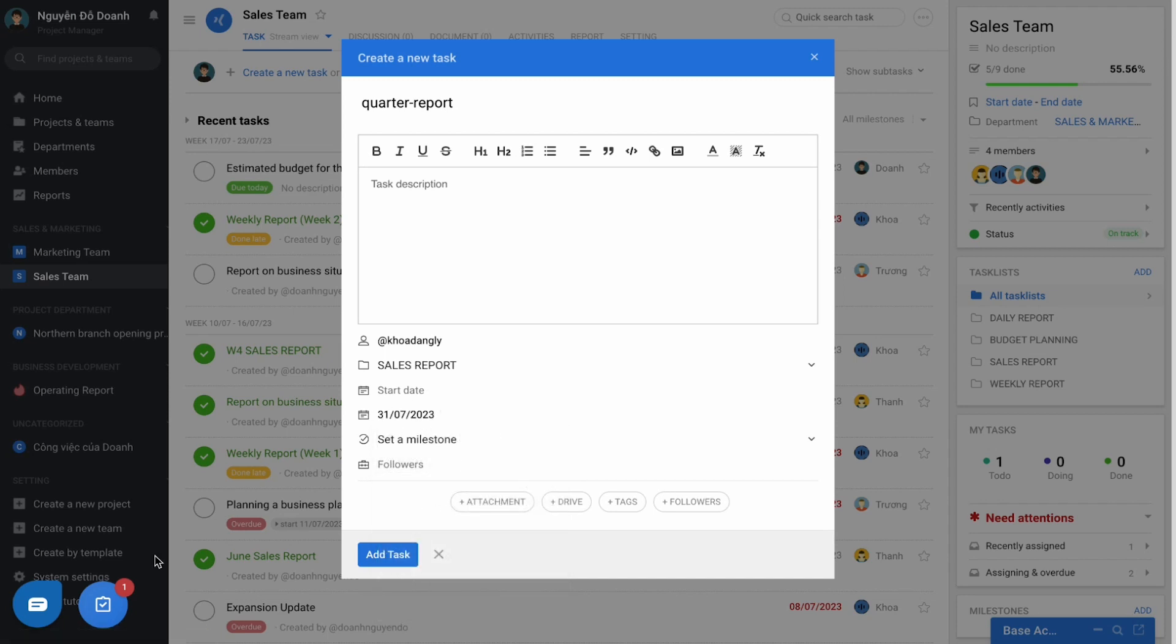A task without a deadline, the software will not remind the user. And if the work has files and documents, you can attach them here with a maximum capacity of 25MB per file.